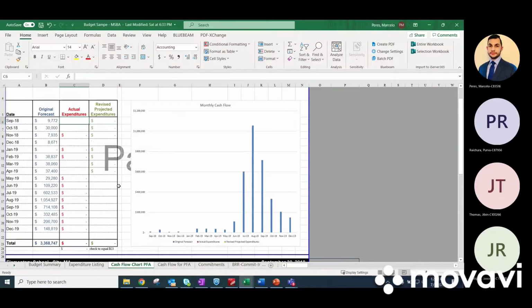If you look at every construction project in a chart, it looks like a bell format. See how it goes down and starts going up and up and up, and then down, down, down. Every project will look like a bell format, just like this one, right? You start with small expenditures, and as the project moves forward, you disperse more and more money. And then during mid-construction, you hit the peak of your cash flow. And then as construction nears the end, those expenditures start getting smaller and smaller. And then all of a sudden, you're done with construction.